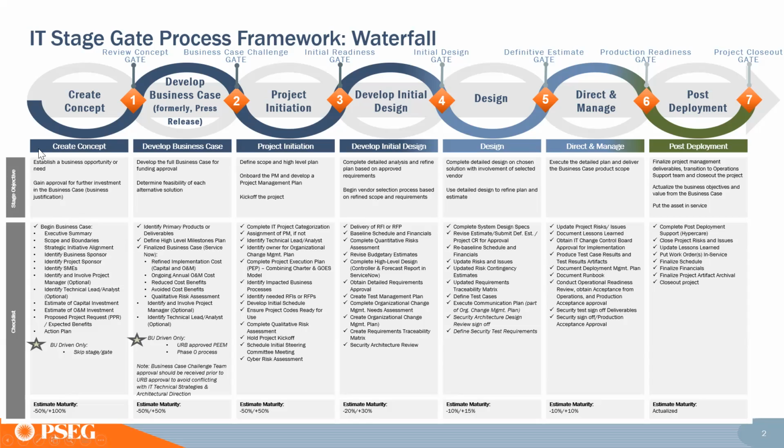And for those, hopefully everyone's familiar. If you've not taken the PM training, please make sure you sign up for the next one or listen to the recordings. At the top, we have these stages. Every project should be stopping at each one of these diamonds, which is a gate, making sure their deliverables related to that stage are completed, which is the checklist at the bottom, before they move on to the next stage.